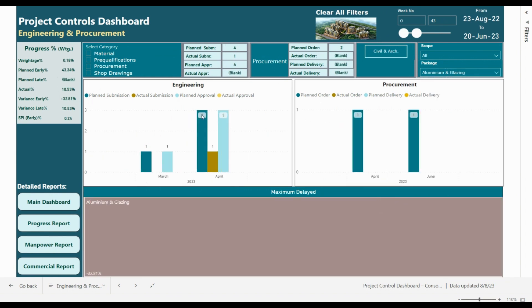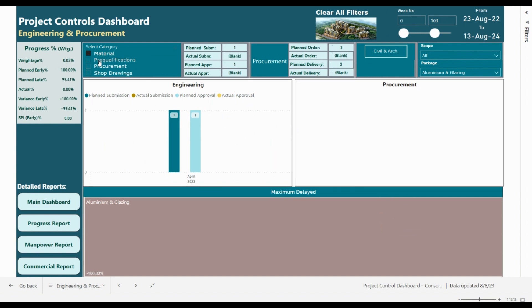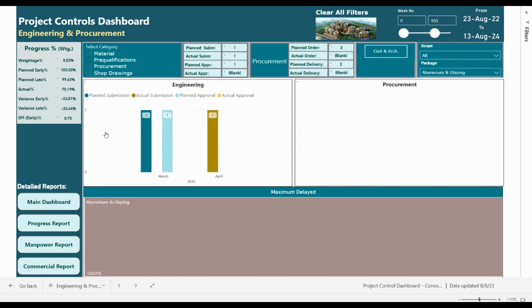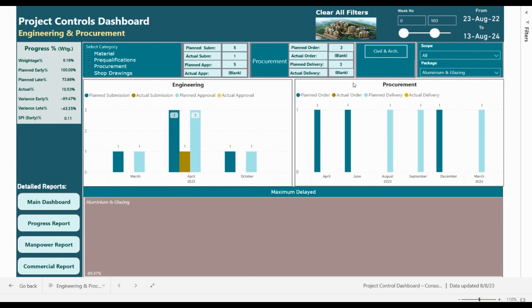We can analyze each package individually — for example, let's choose aluminium and glazing. We can increase the time bar to review the required engineering, analyze the material, analyze pre-qualifications, etc. This box also presents the aluminium package with variance in early and variance in late, and you can see whether this is a critical delay or not.